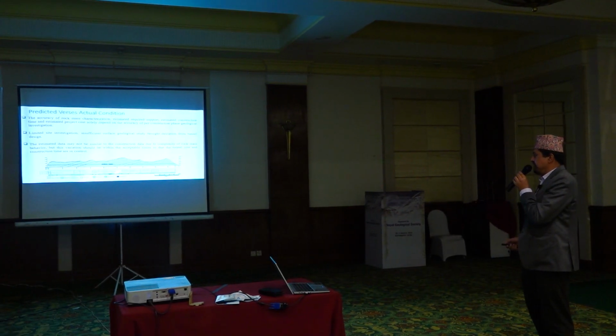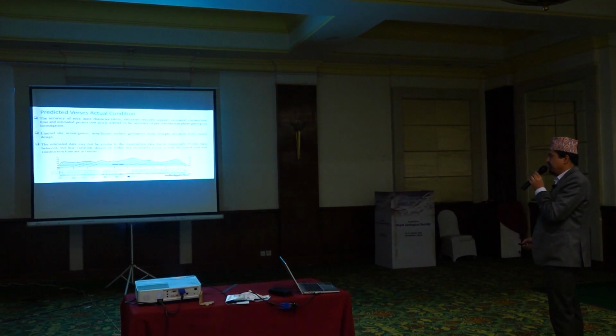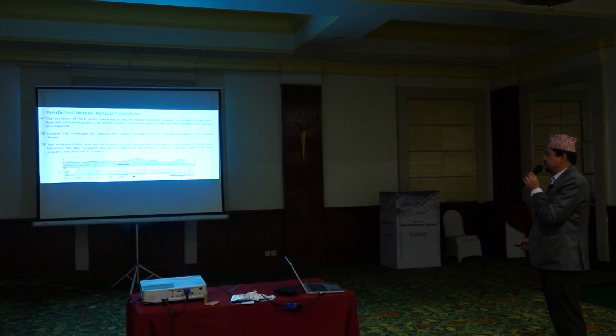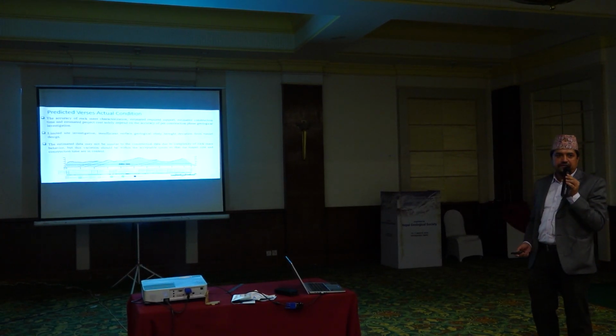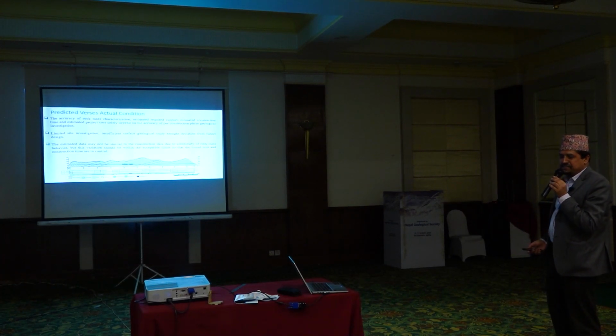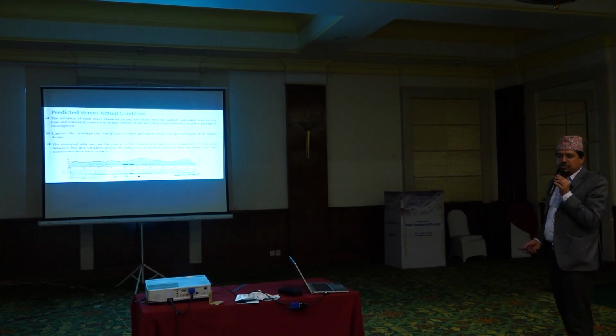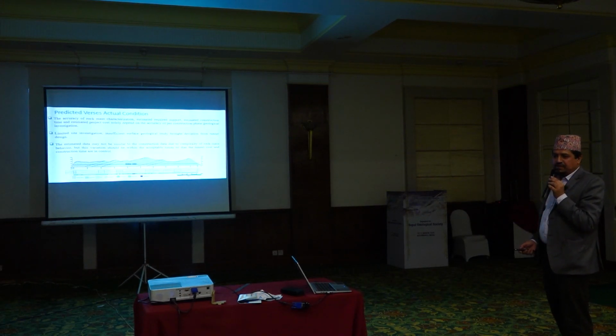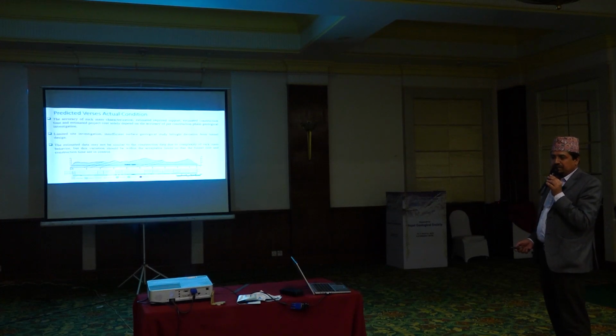This is the geological cross-section of the maps that shows that, as for design and as for actual construction, there is a variation in the rock type, so that the time has increased, and similarly the support maps that we use in the tunnel have been changed. The consequence is that the time and the cost have expanded and increased.